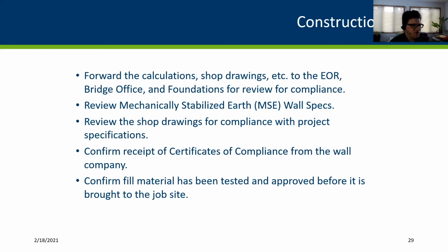You should make sure that you're confirming you've received those certificates of compliance, especially for the backfill material, but for all components of the wall. And then confirm that the fill material has been tested and approved before it's brought to the job site. It'd be terrible to bring in a mass of soil and not be able to use it. It's a huge expense to everyone and a waste of time. So because that's the major component of the wall, it's one that should be closely watched.